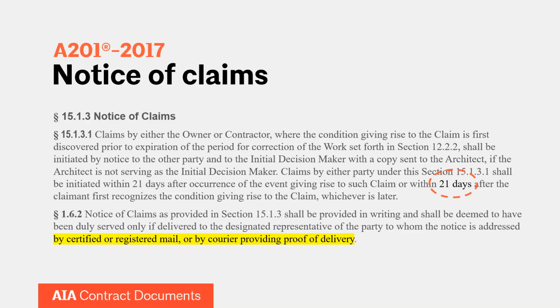I think that would, in all likelihood. Again, can't be 100% certain because we're lawyers and we have to hedge everything, but in all likelihood, that is the most clear-cut example of something that's out of a contractor's control. And you had referenced Section 8.3. If you look to some of our other contracts, for example, the A105 that a lot of people might be using for residential or smaller projects, you can look to some other sections that look a lot like 8.3, but would give you those same rights if your jurisdiction has shut down work. For example, I think in the A105 it's 11.2, but it would be others throughout the other set of documents. But to answer your question, my gut is that yes, that would be the kind of thing that would trigger a proper delay claim. What do you think about that?